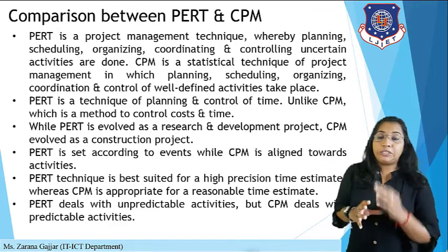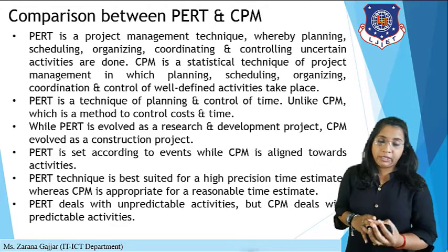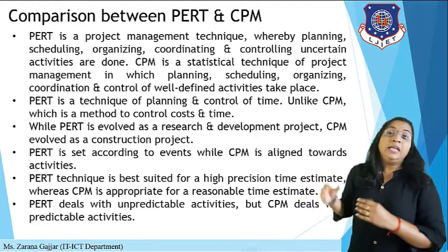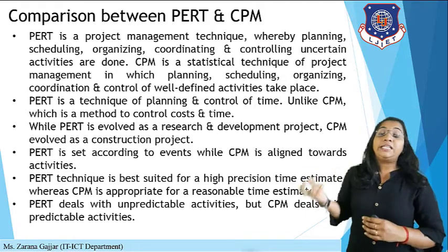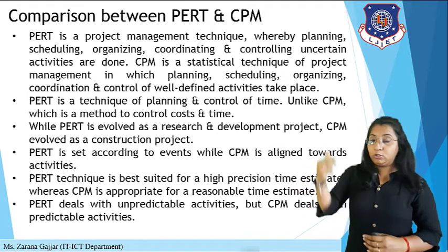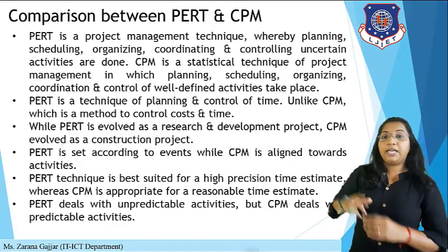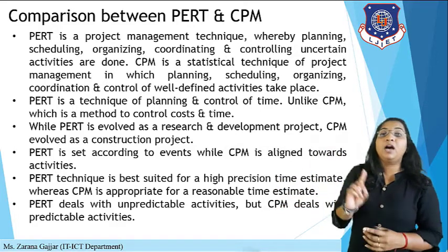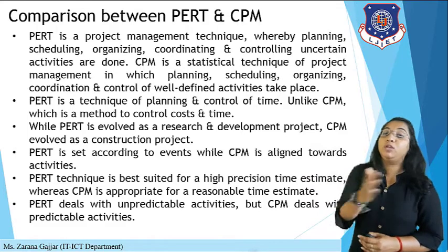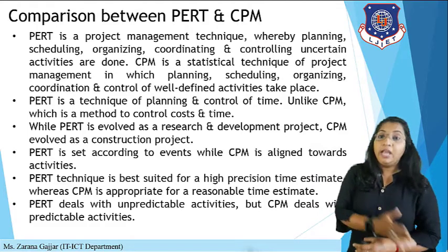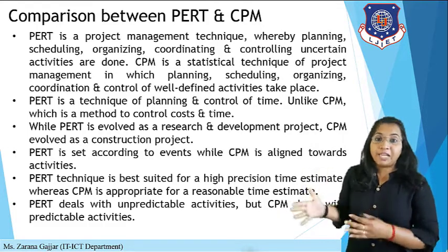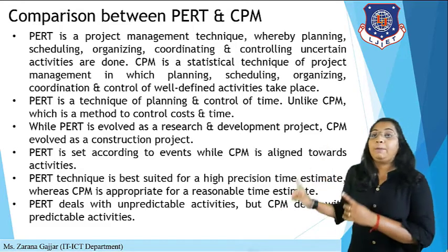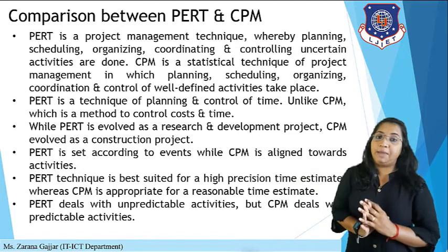But if your project is a construction of anything or an implementation, then CPM is the best method. Another difference is that PERT is set according to the event. Based on how many events there are, you can schedule a PERT chart, while CPM is aligned towards activities, how many activities there are. Similarly, the PERT technique is best suited for high precision time estimates, whereas CPM is appropriate for reasonable time estimates.